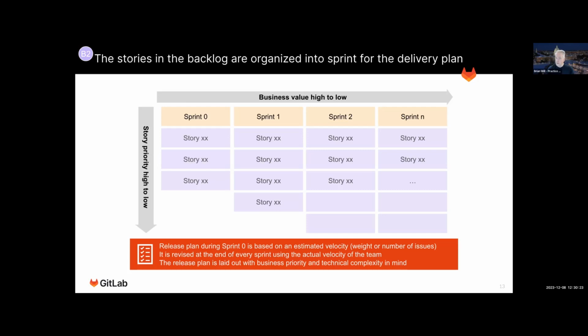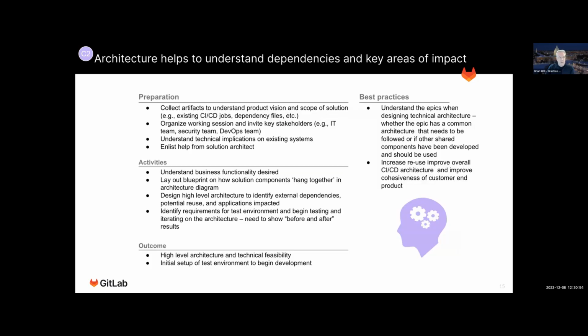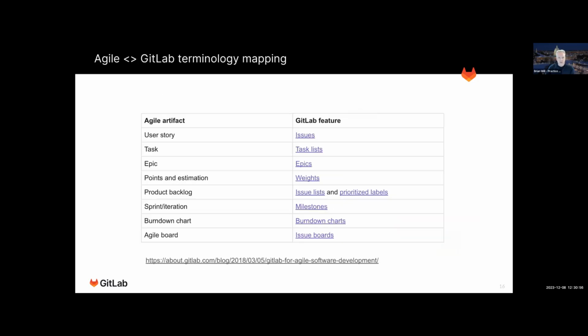Especially on time and materials contracts, I've seen that dynamic, that people basically are running out of money. And if you get them involved in this prioritization process, it's very often the customer who's like, okay, we're done. Well, we basically are running out of money. This is good enough. We can live with this. So just keep that in mind. It's a fairly dynamic way of project management, but it's also now more and more pretty openly accepted. There are a couple of examples here. Don't have to go through this. That just sort of mentions the ABCs and how you do this.